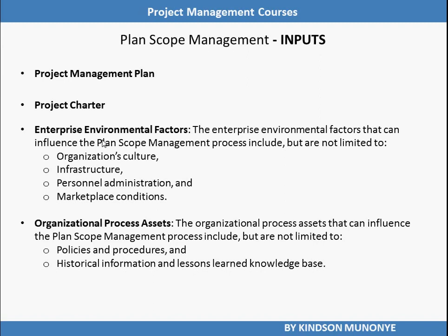Why do we need the project charter as an input to plan scope management? Because the project charter provides the context needed to plan the scope management processes. It provides a high-level project description and product characteristics from the project statement of work.